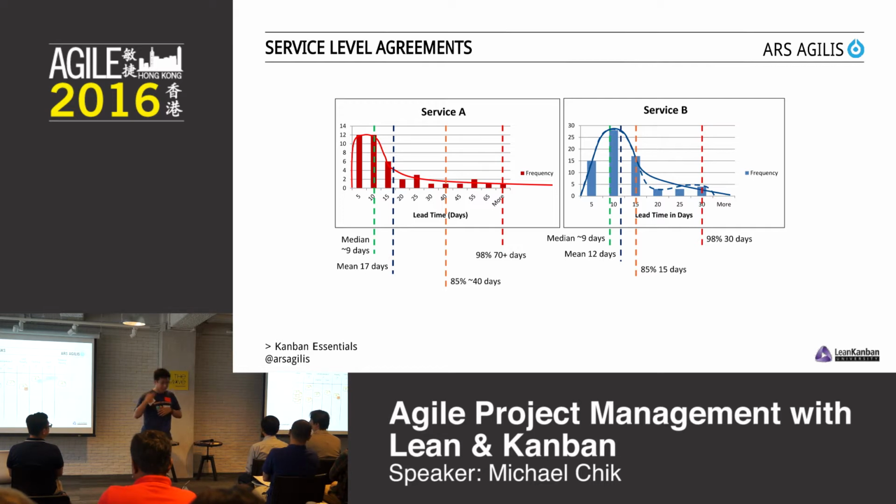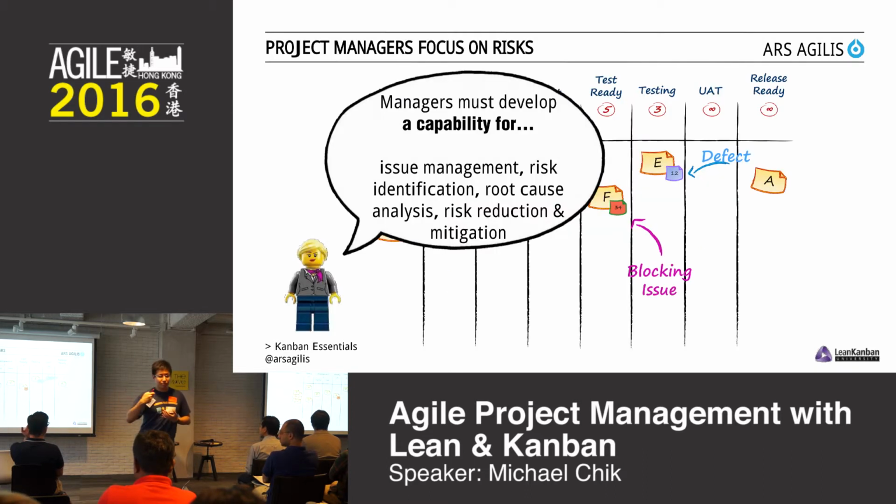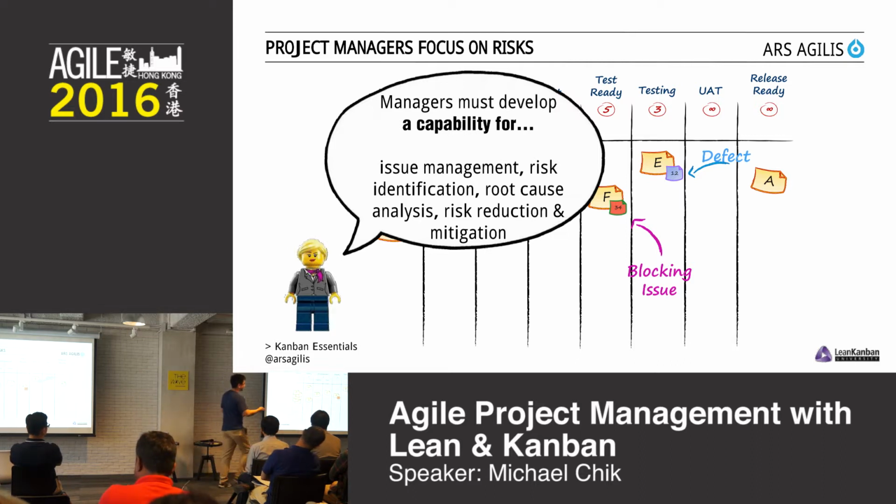So, if you're running a project, you have a Kanban board. When we encounter defects, usually what we do is we create new tickets. And we take the old one and leave it there. So in this case, we will take another ticket, put it on the old ticket as a blocker. Well, actually not a blocker. We call it defect because it's a defect. If it's a blocker, we tend to use red because it stands out.